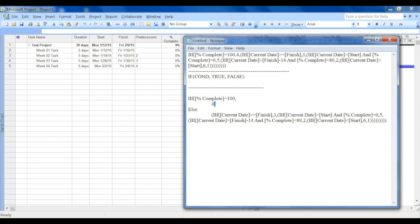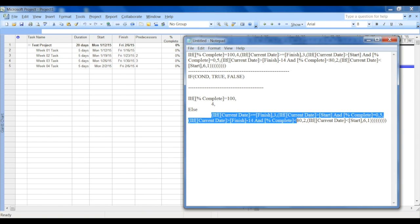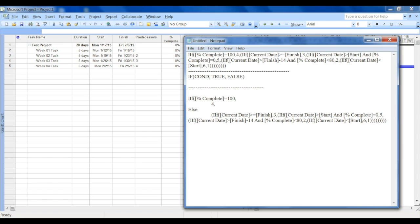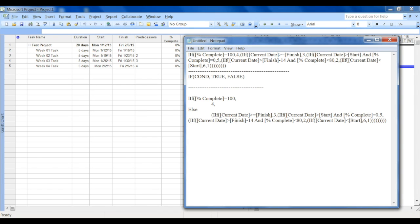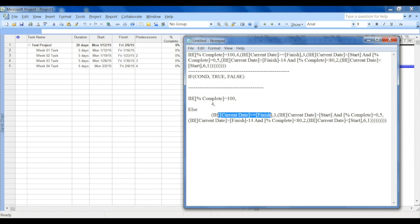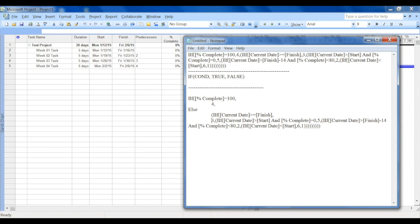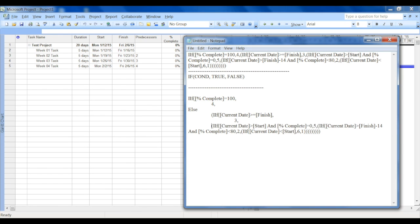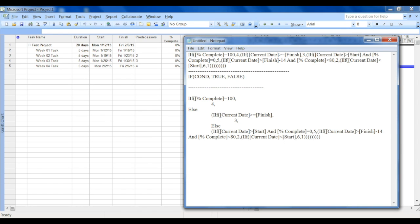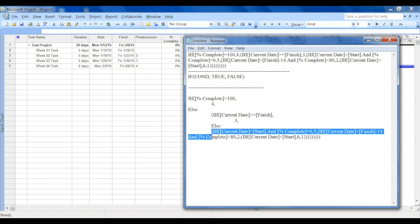So if 100% complete, display four, else do this. Now what is this? This is another nested IF condition. So let's again split that out. If the current date is greater than or equal to finish, that's the condition, and if the value is true then we display number three. If not, everything else goes under the else condition.